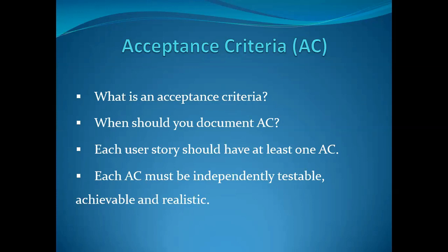The reason I say that is that if a BA writes wrong requirements, it's just like garbage in, garbage out. The BA has written wrong requirements, passed them to the developer, who builds the wrong thing, the wrong product. Then the tester writes wrong test cases and tests the wrong product, and when you try to deliver to the customer, the customer says no, this is not what I requested. That means the project has failed, from start to finish.